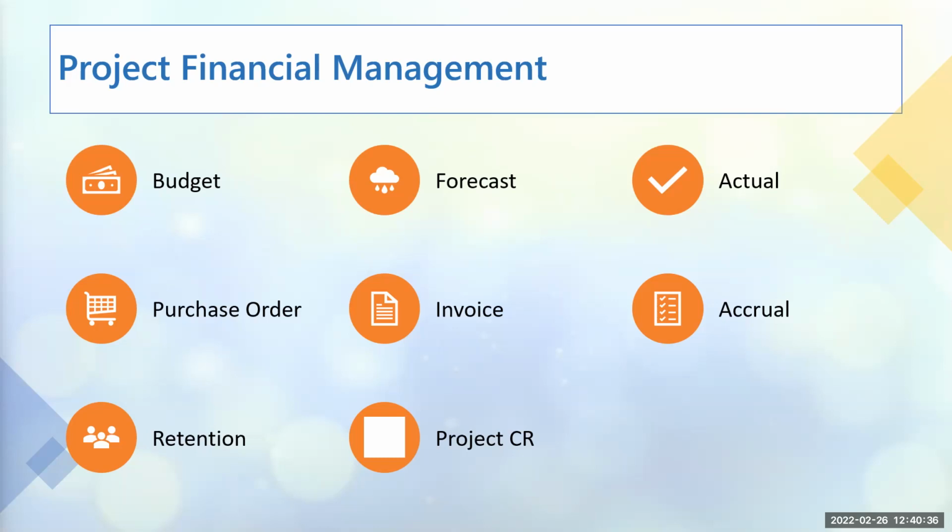So when you come in as a PMO, you tend to support with the invoice generation. It is not in all PMO roles, right? I've told you that the key things in PMO is the budget, forecast, and actual. All of these ones are additional if you find yourself in an environment that does that, or that wants you as a PMO to be involved in it. So the invoice is being generated. You review the invoice to make sure that it aligns with the work that has been done by the project team. That's your role as a PMO.